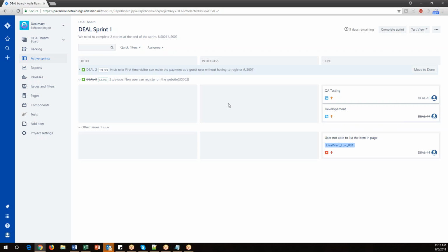All these things we have to update as a status. But the Scrum Master will take care of whether we need to continue, but there is no chance to expand the sprint. Expansion of a sprint will give you a wrong result. That is not a traditional way of doing agile. Once we fix the sprint duration at 2 weeks, that is fixed. If something is missed or not yet completed during that time, it will be moved to the backlog, and again we will plan it for the next sprint.